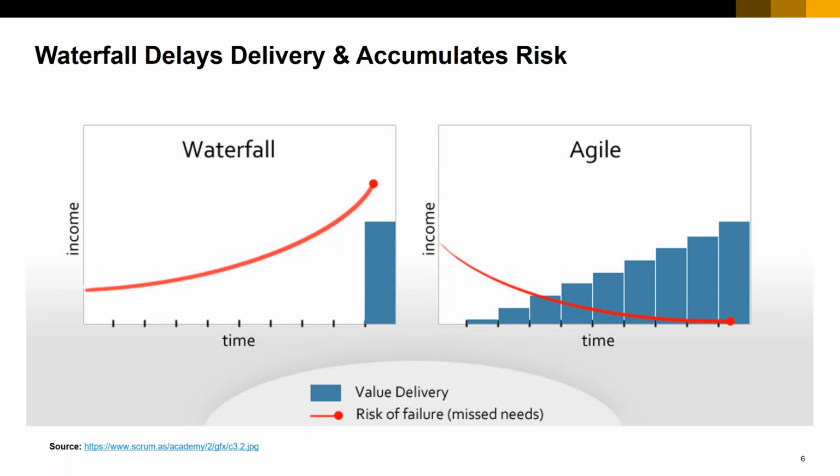So right from the business case to the development of the product to the testing of the product, everything is happening in-house within the organization, right? And then we are just delaying the whole delivery. For example, even from our company, we used to launch a product once in every 1.5 years, right? So that's 18 months was the cycle that we develop a product and then we launch a product. That means that we had collected some requirements 18 months back from the market, and then we had been developing all through the while.